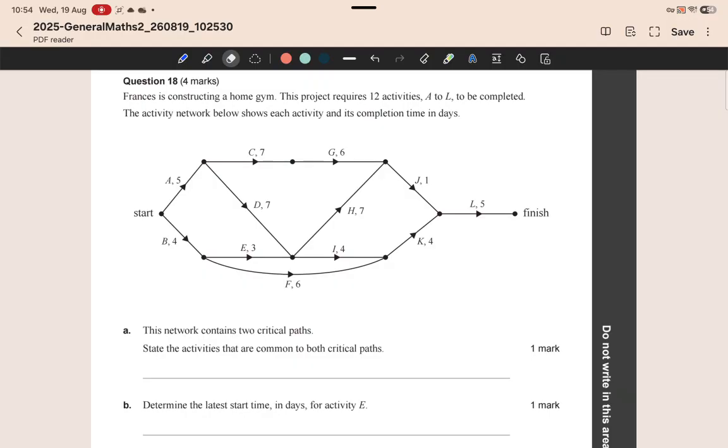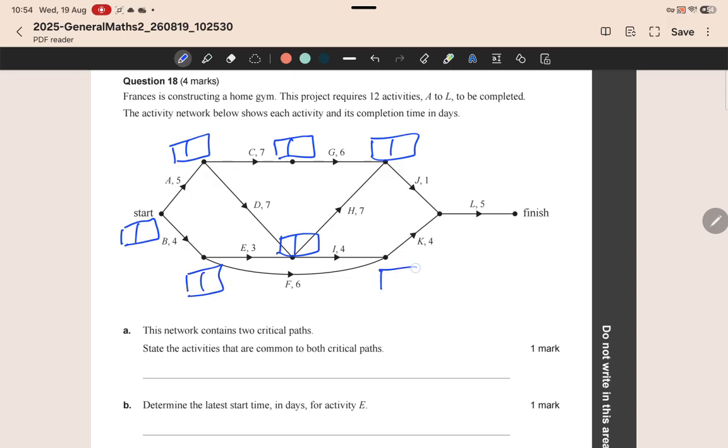So in order to find a critical path, you have to do a forward scan and a backward scan. Now, I usually start by putting a box. I have made this video before, but with respect to this question, I'll do it again. And then I start by doing a forward scan. Each of these boxes represents the earliest start time and the latest start time. The earliest start time is from a forward scan, and you always take the larger value.